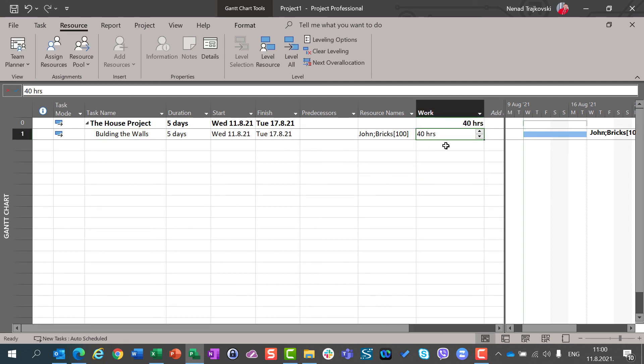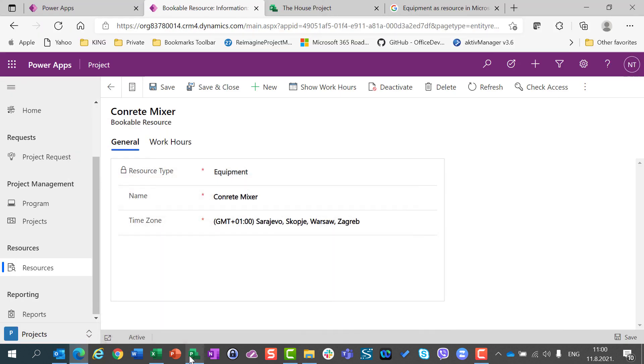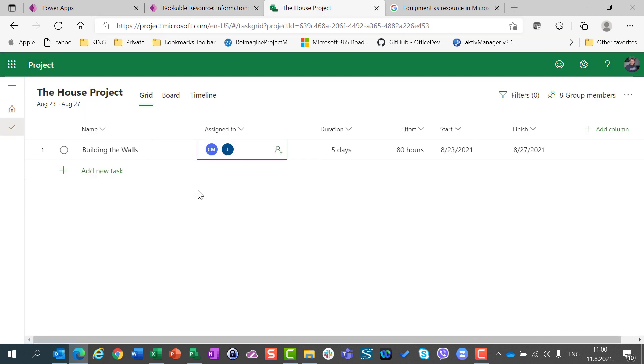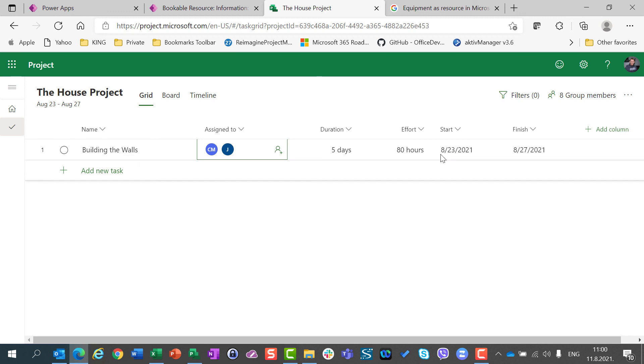And I still need forty hours. So, it means that John will build the wall in five days, in forty hours, and he will use 100 bricks. That, those bricks, are not possible to be defined in Microsoft Project for the web. So, only machines, or equipment, which will take a time, which will have an effort. But not pure material resources, as bricks are.